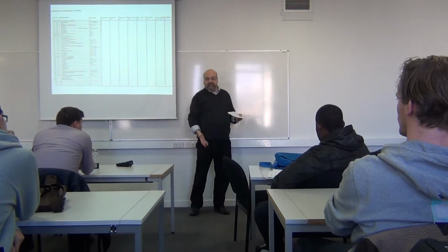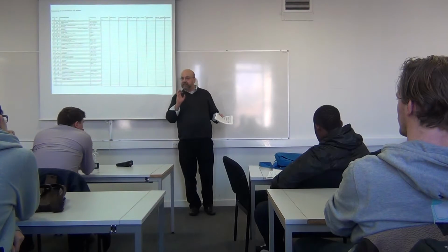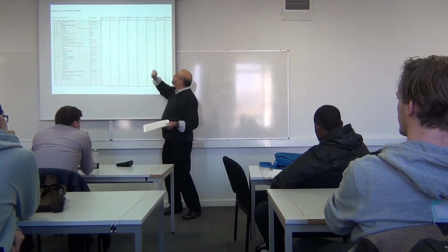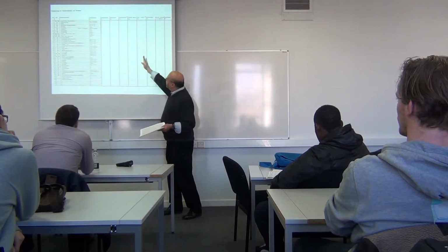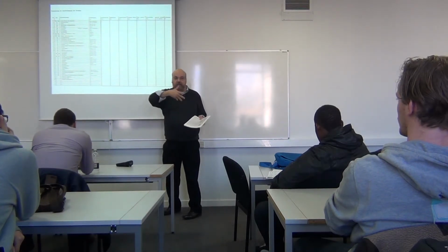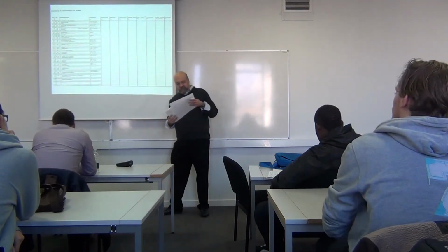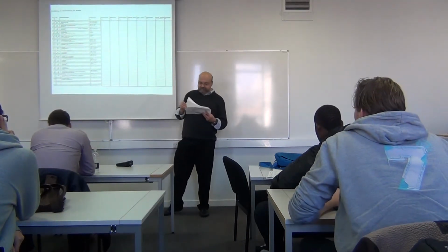there are some things like screed, you don't need any special plans, but let's say every steelworks, you need specialized plans and so on. Till when does he have to submit this? Till when do they have to be checked and given an okay? These plans. Till when has to be the, wait a minute, I've written all that.